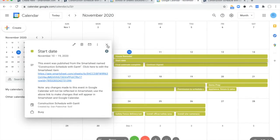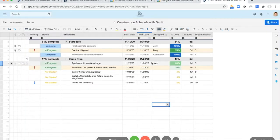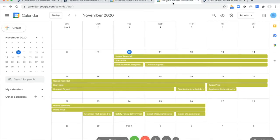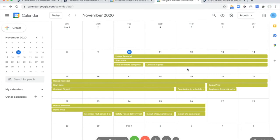So one important thing to note is that this is a one way street from Smartsheet to Google calendar. If you come in here and edit something, it will not change it in the sheet. So you can make a bi-directional system using the API or using something like Zapier, which is a third party API manager. And that way you can have changes go back and forth, which can be useful. But it's really important that you keep your data accurate.